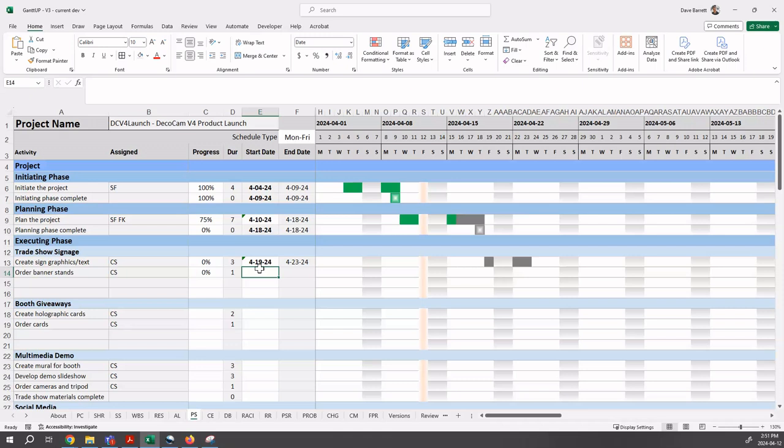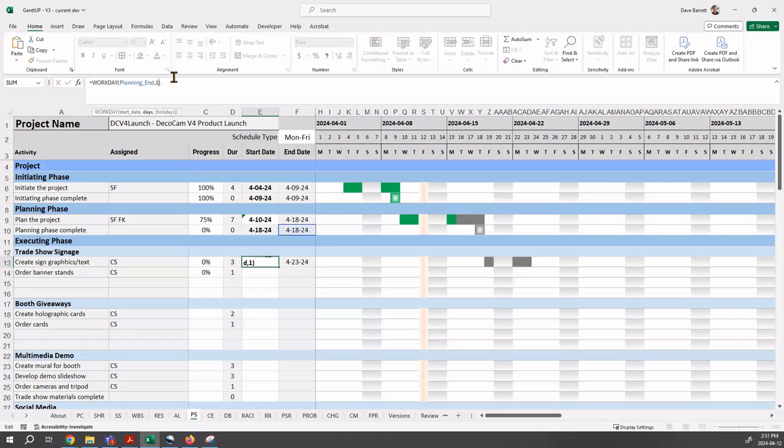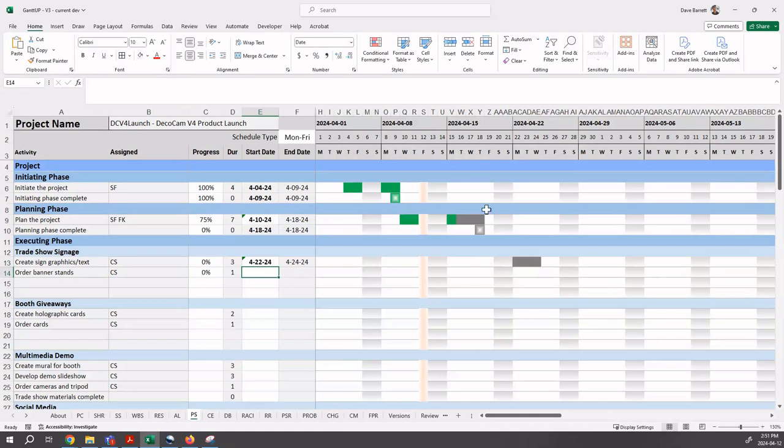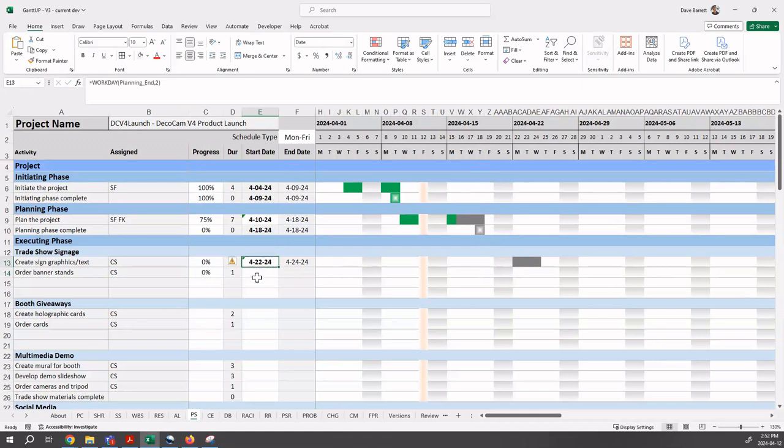Here's another example where if we said, well, let's have a bit of a lag, let's make it, let's have a one day lag. And we'll press enter. Notice how it jumps over Saturday, Sunday. So instead of, normally if it was just a one day lag would be on the Friday, the two day lag really then starts on the Monday. So if you use a Monday to Friday day, you need to use the workday function.